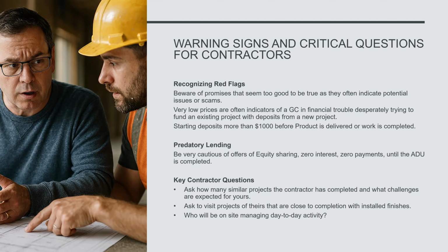Also, keep an eye out right now for any contractor that is charging more than a $1,000 deposit before getting started with their work. Particularly within the Altadena areas, and I've been around Southern California for a while, we've had our share of disasters every now and then. When that happens, all kinds of contractors fly in from around the US, set up shop over here, get a couple of people to sign up because they're desperate, and then they take the money and run. So definitely you don't want to be starting with any deposit of more than $1,000